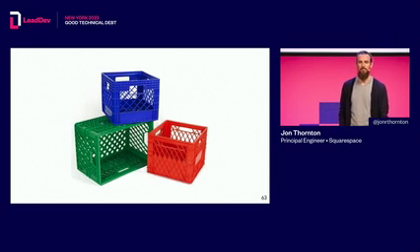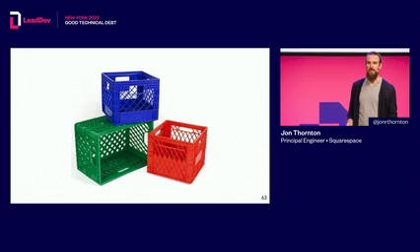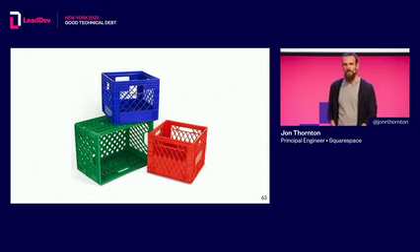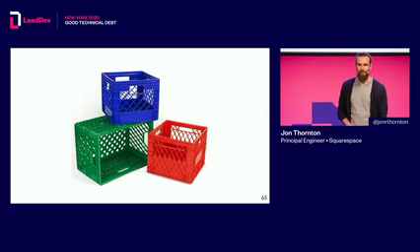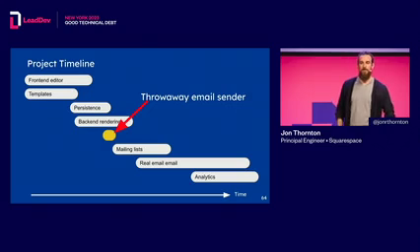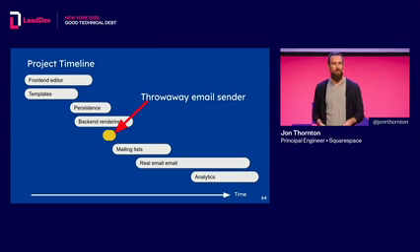And this is where good tech debt comes in. See, the finished product was going to need the capability to send billions of emails, but we didn't need that capability right now. For our experiment with coworkers, we'd only be sending a couple hundred emails, and our coworkers could tolerate a little bit of unreliability. And something that sends a handful of emails unreliably is way easier to build than something that sends billions of emails reliably. So we realized that we could quickly build the unreliable sender now, unblock getting feedback to our editor sooner. And then later on, we'd throw away the unreliable sender and replace it with the real thing.